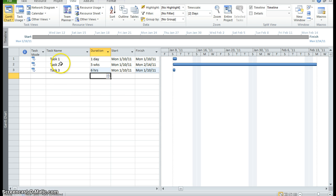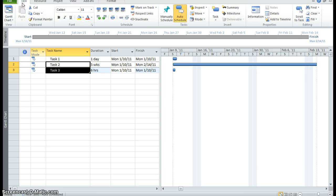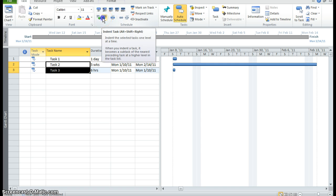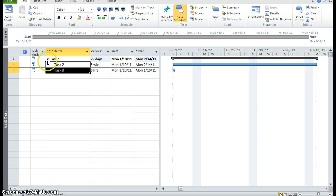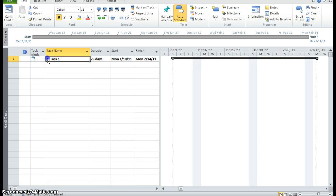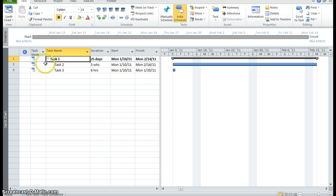Now I want to make my task 1 a summary task. So I'm going to click in task 2 and task 3. I'm going to go to the task tab and I'm going to click in the schedule group. I'm going to click the indent. And you can see that task 1 is now a summary task. It indicates that by the minus sign. So if I click on this minus sign, it turns into a plus and all of the subtasks rolls up into task 1. I can release it.